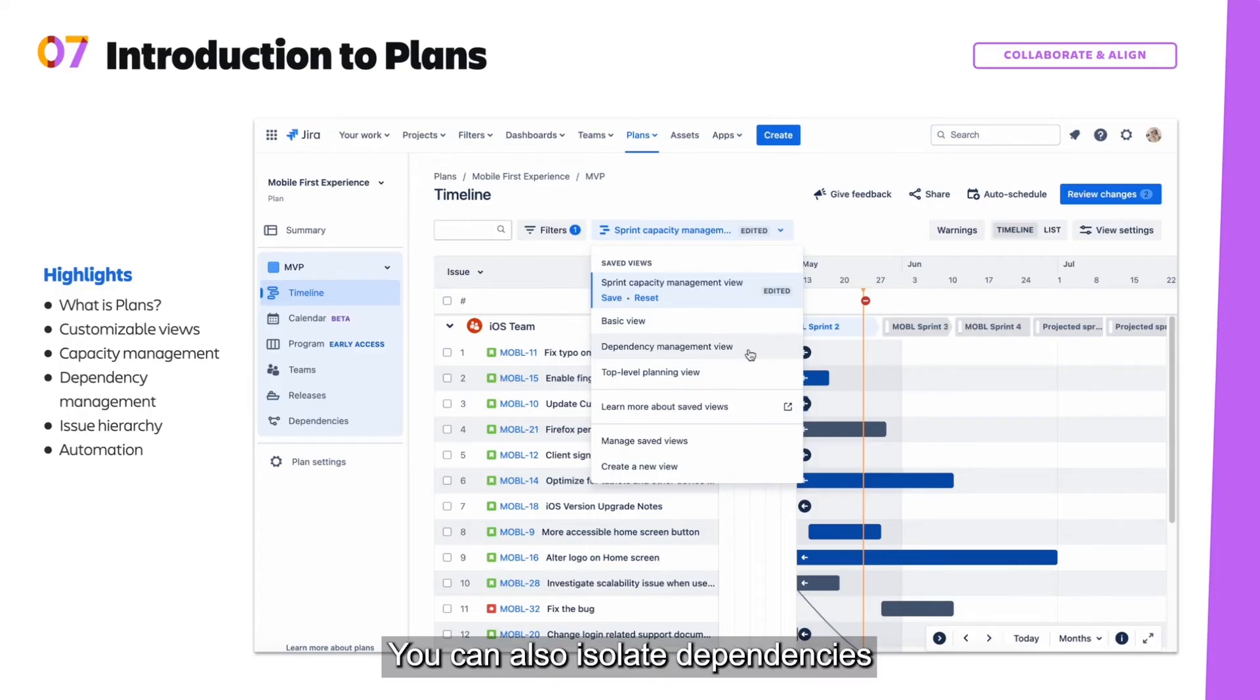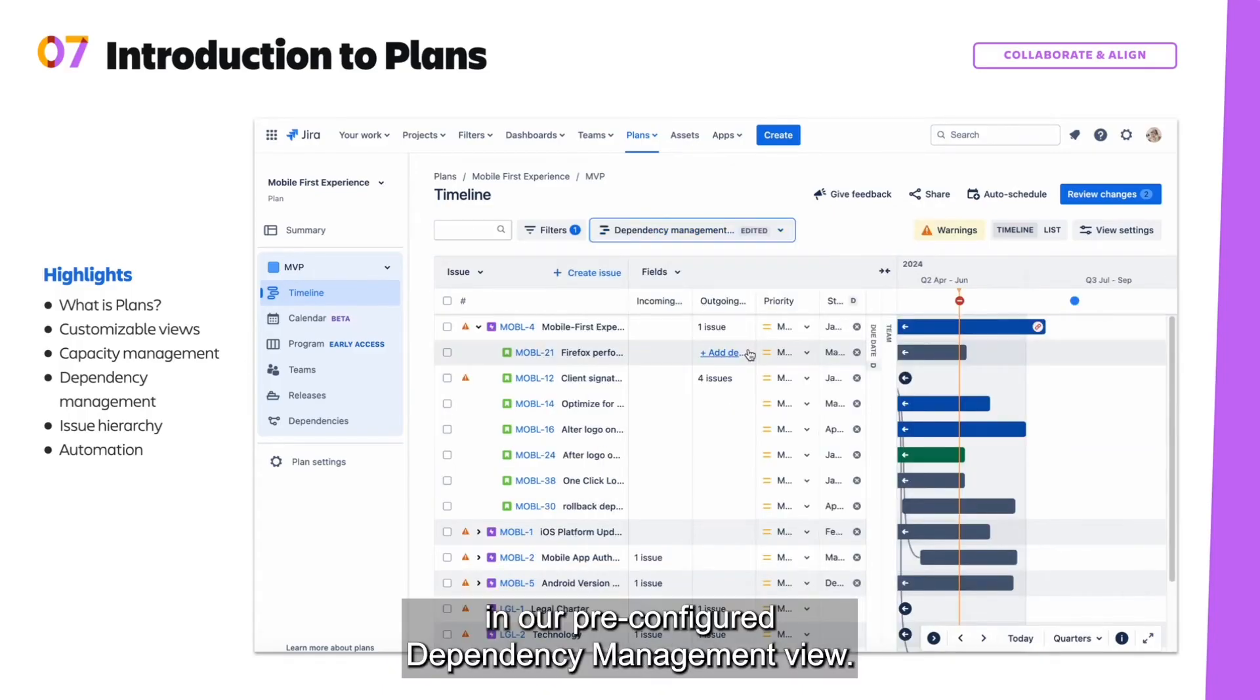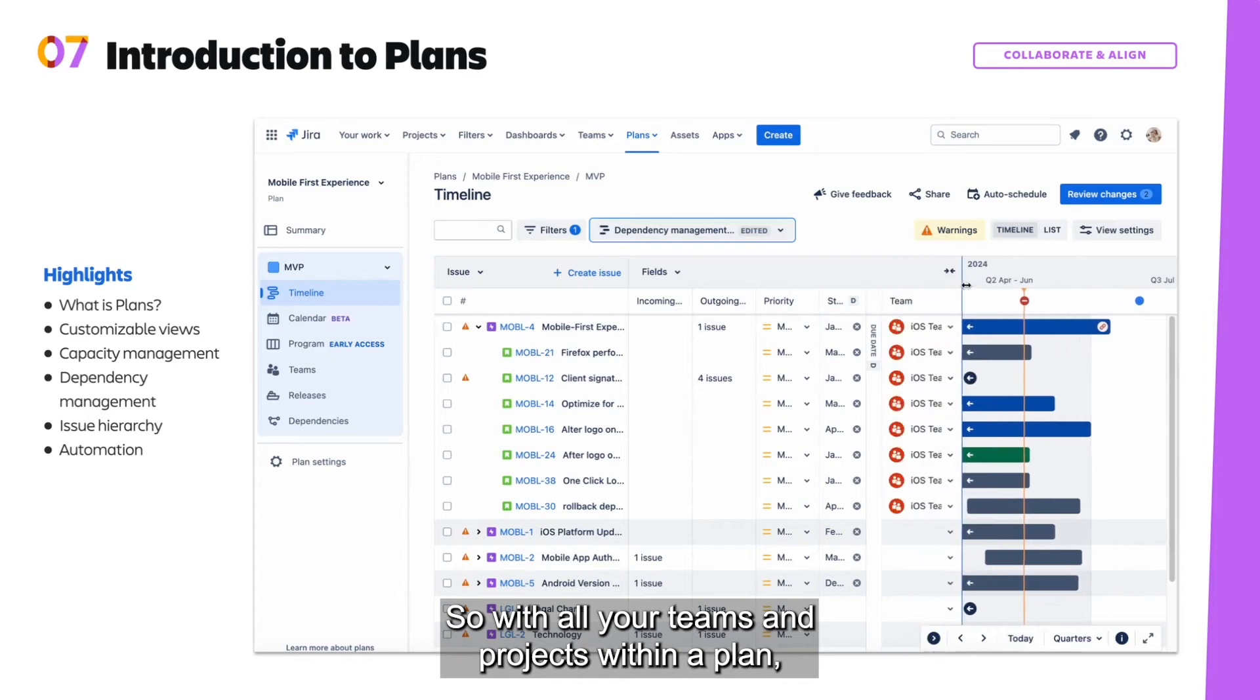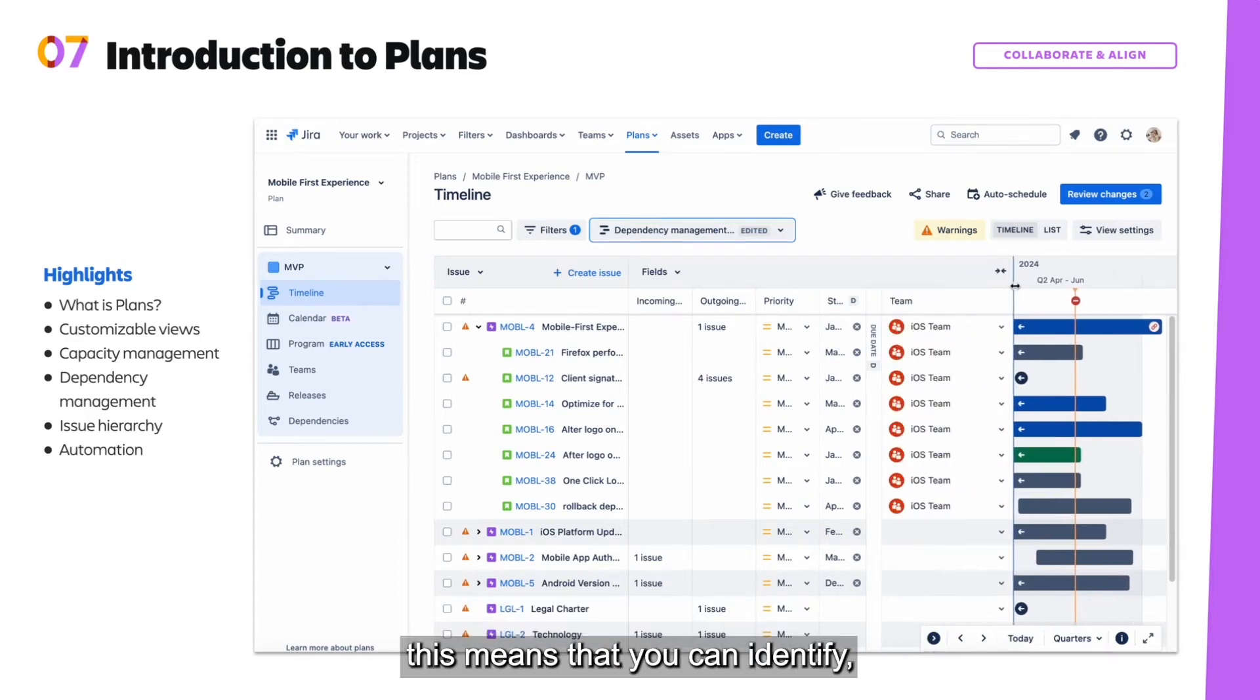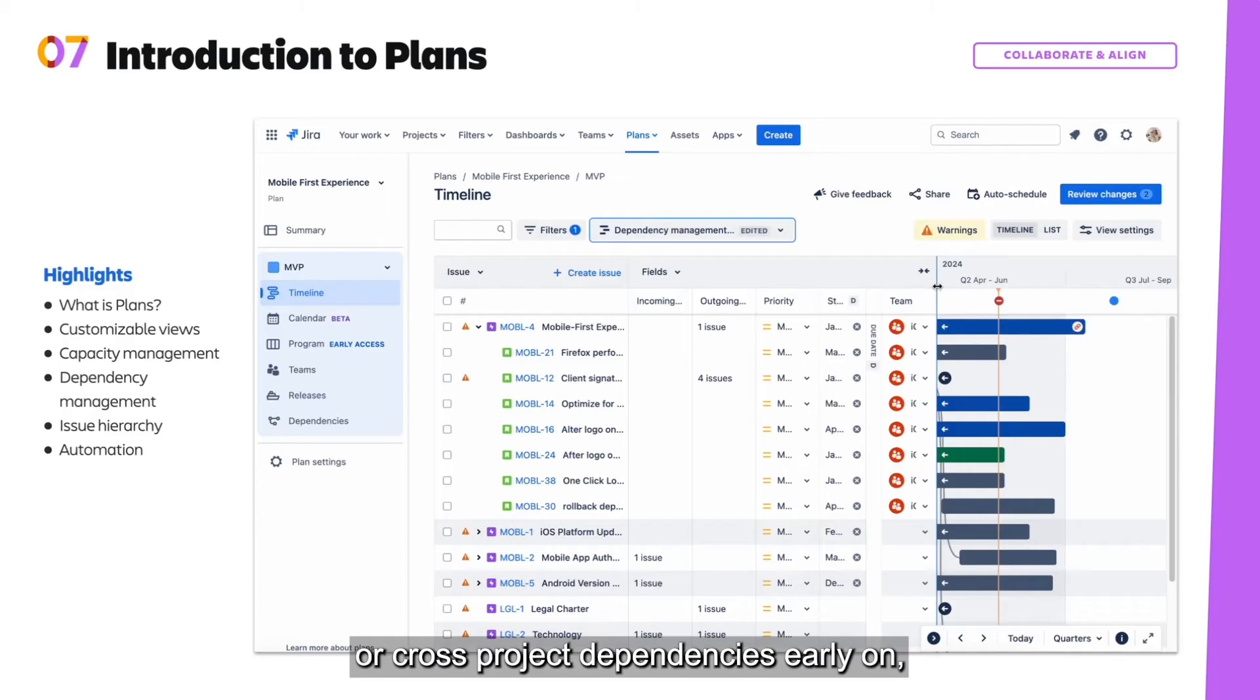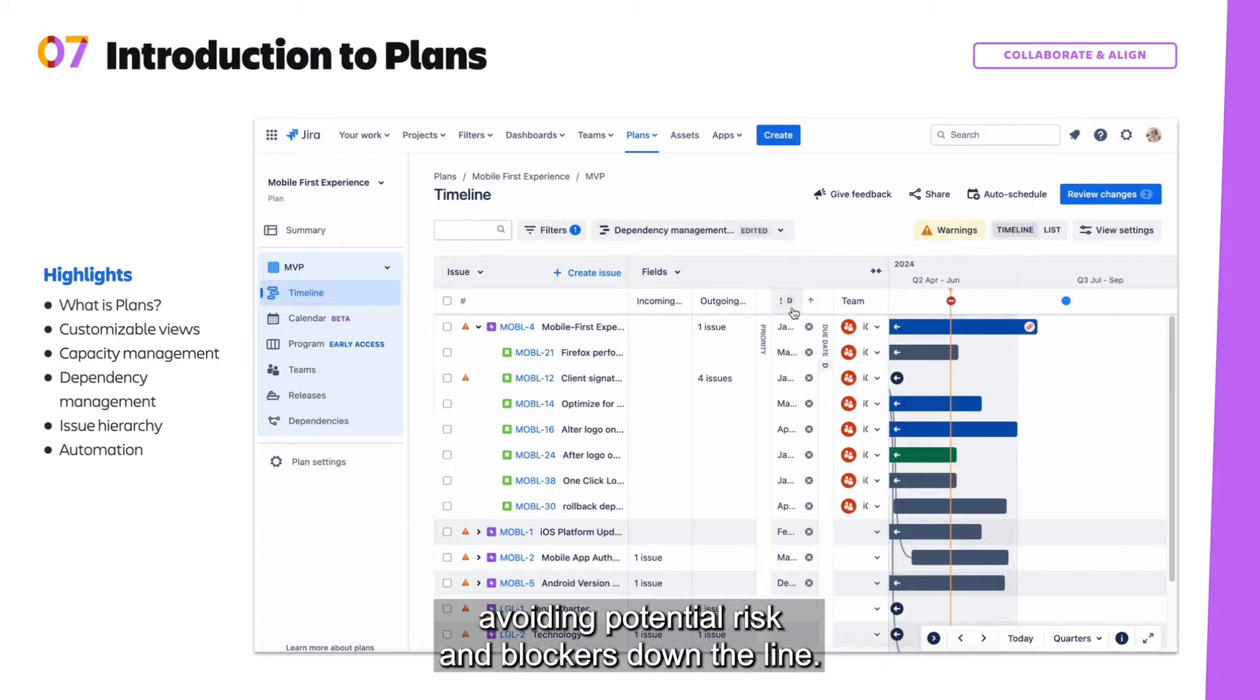You can also isolate dependencies in our pre-configured dependency management view. So with all your teams and projects within a plan, this means that you can identify and resolve cross-team or cross-project dependencies early on, avoiding potential risk and blockers down the line.